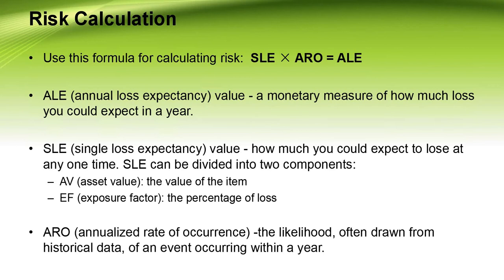Firewall logs indicate the organization was hit hard 1 time per month by a DOS attack in each of the past 6 months. You can use this historical data to estimate that you likely will be hit 12 times per year. The information helps you calculate the SLE and the ALE. The ALE is explained in greater detail shortly. An asset is any resource that has value and must be protected. Determining an asset's value can more simply mean determining the cost to replace the asset if it is lost.